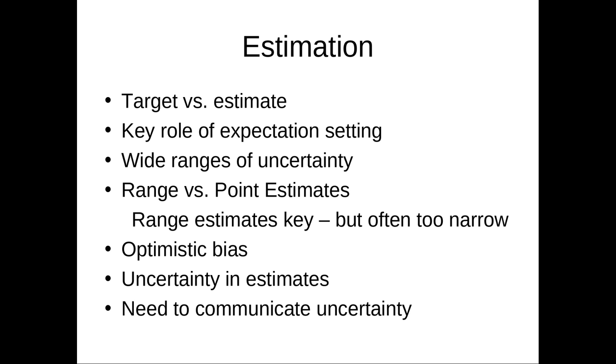We're going to need to upgrade or update this portion of the product because it's using an old version of the library. We really need to use the new library with this. We have to modify this interface between this part of the system and this other one. We're going to need to get this developer on it who specializes in parsers but is busy until a certain date. It forces you to think in very concrete, specific terms about what's needed, what the vacation days are, how long certain things will take, who's needed for it, et cetera.